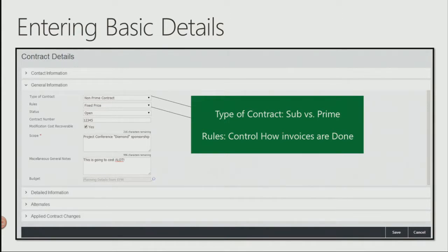So, some of us with large cap projects, let's say you're in a construction site and you have a vendor that's digging out a trench and they find a piece of granite, okay? In this case, you would allow that vendor to keep digging, get through the granite, and then they could exceed the contract value essentially, and then you do budgetary changes afterwards. Okay, but it comes down to traceability, how you're recognizing those changes. Next, you could do recoverables from a financial perspective, details in here, and so on. So that's just giving you a high level on the general constraints of creating a contract.